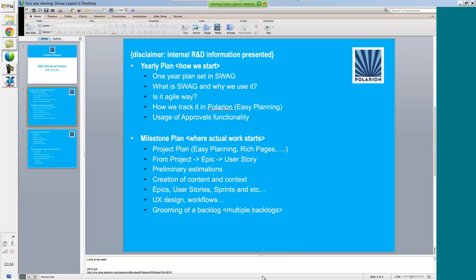So this actually helps us to understand not just the standing, but also the potential risks of the features being delayed, and how we should reprioritize features or how we should manage the backlog and scope to ensure that we actually either deliver on time or put more resources on this project. Also did a bit of pivot table here to indicate what is in which status.